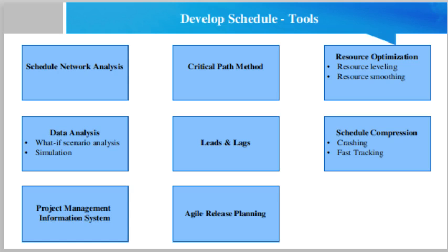Schedule compression. It includes crashing, a technique used to shorten the schedule duration for the least incremental cost by adding resources. Fast tracking, a schedule compression technique in which activities or phases normally done in sequence are performed in parallel for at least a portion of their duration.